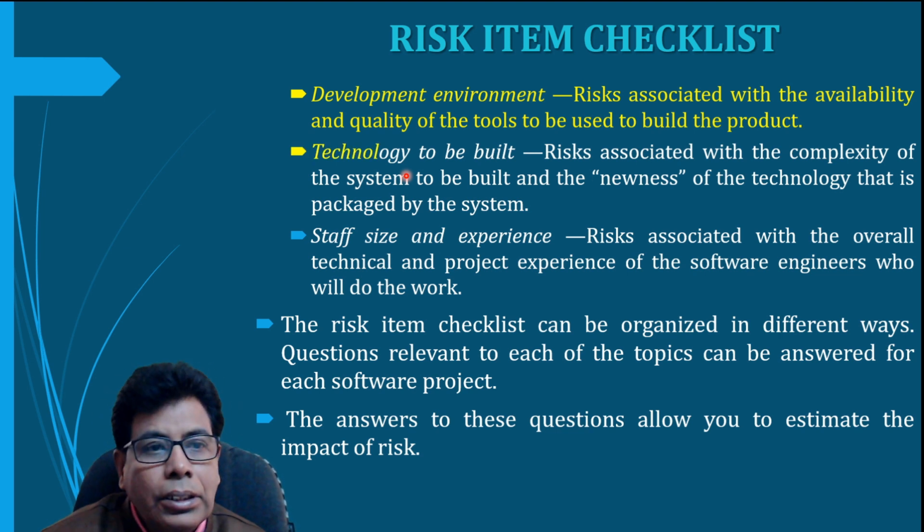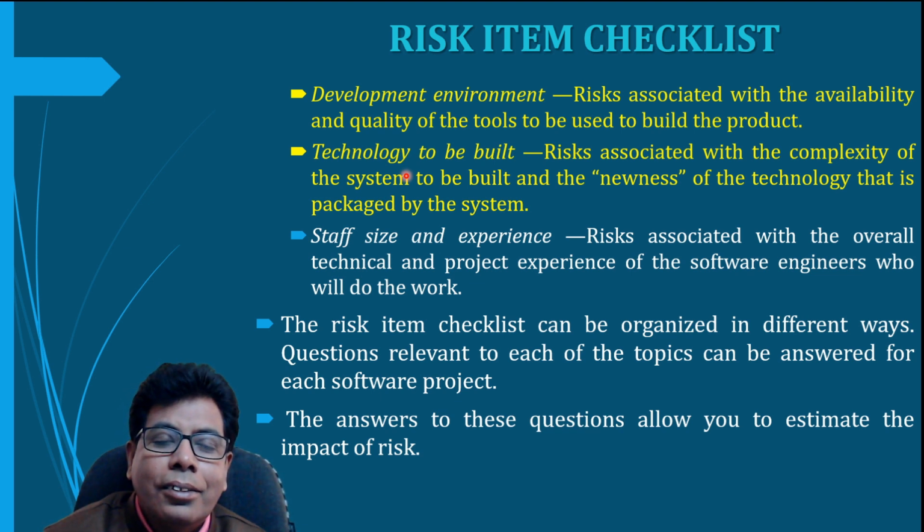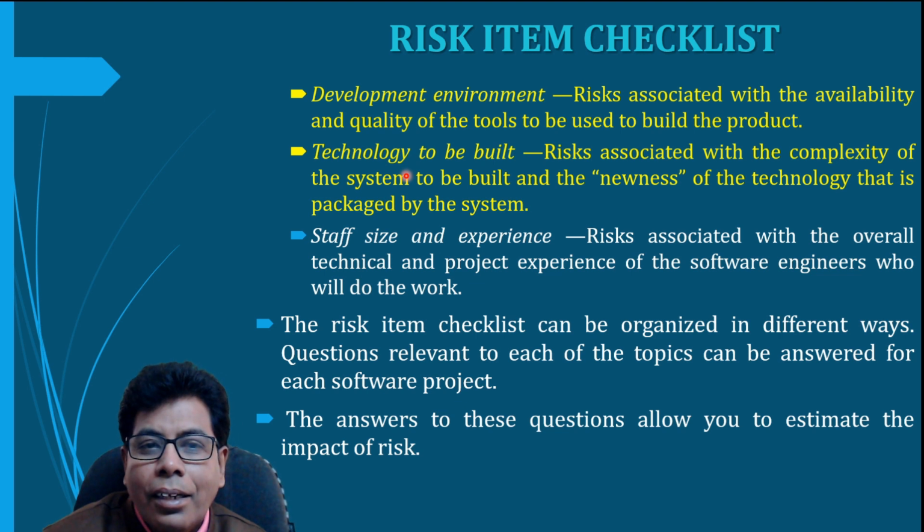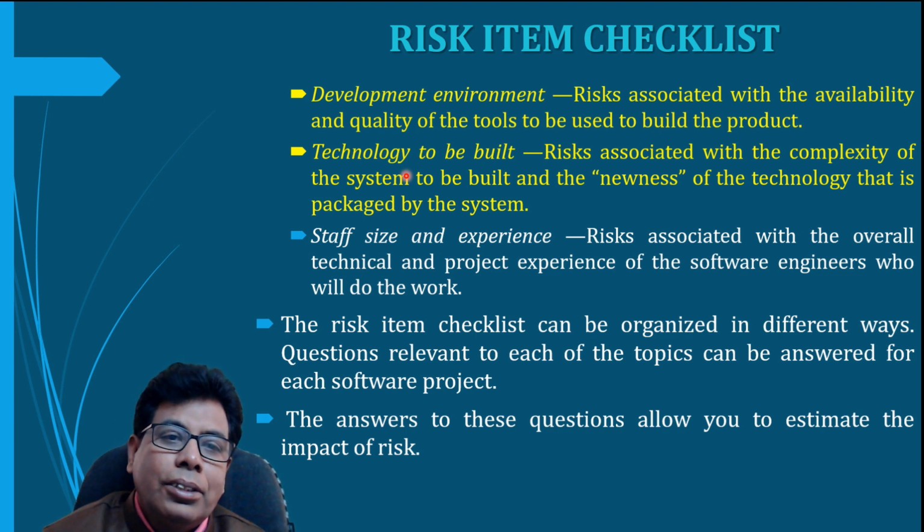Then the technology to be built. Here, the complexity of the system and the newness of the technology matter. If it is unknown, then it will lead to risk, because the team members will have to learn the technology before the implementation.